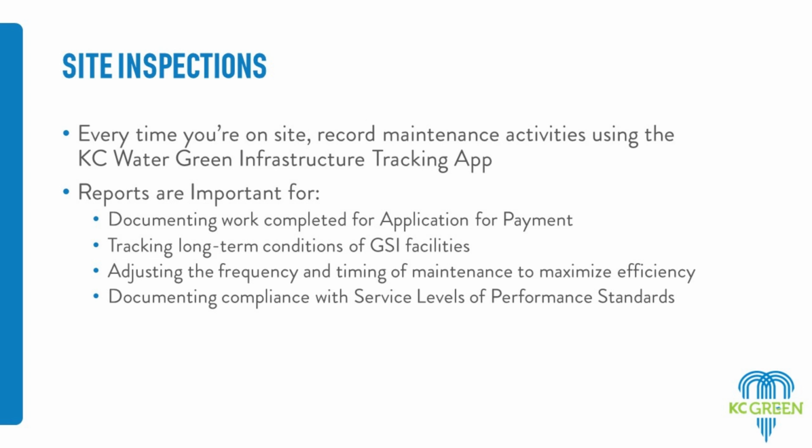One thing I'll say is we have an understanding that when you're first out at these sites, they are not going to meet that in terms of maybe function. Definitely plant cover. We understand there's no way there's going to be 90% plant cover on the majority of these sites, and we're not going to ding you for that. What we're looking for is that over time we are improving this, and we're going to start addressing those issues and retrofitting those plants. So don't think that just because this has 40% bare area, that's going to hurt us. We understand that that's what you're going to see when you start out at these sites.